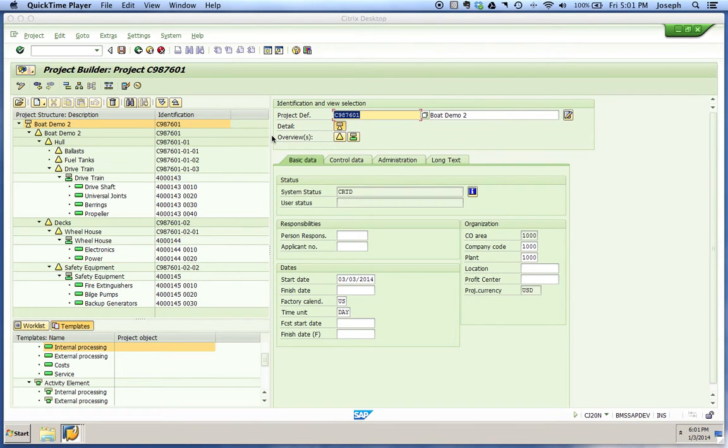For this demo, we're going to show how to control an end date of a project with a hard stop constraint or let the dates adjust when critical path is extended. Controlling a date on your project is done via scheduling parameters. Here, project managers can specify how the scheduled dates on networks or activities impact the constraints required by any agenda. The Adjust Basic Dates indicator in your project planning board controls whether a critical path end date should move or be a hard constraint when scheduling.